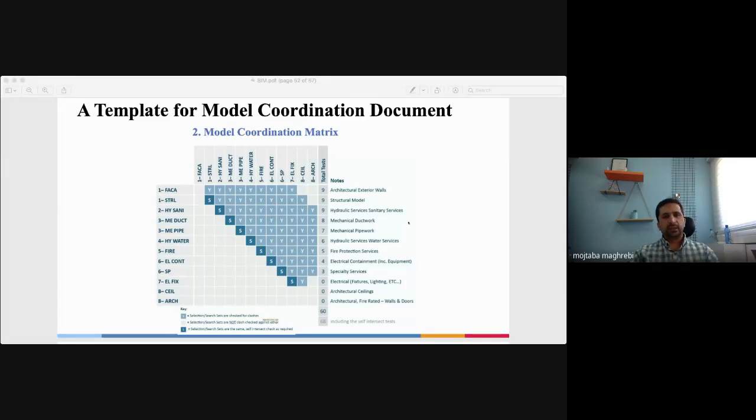But try to have a responsibility matrix for your BIM models. You can see that all of those abbreviations have been listed here. For example, for architects, which parts of the information can be included, who is in charge of what, who can only view the models, who can change the model, who can save the model, who can extract information, and so on.